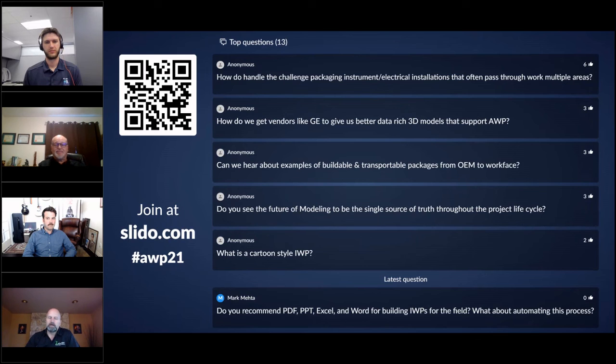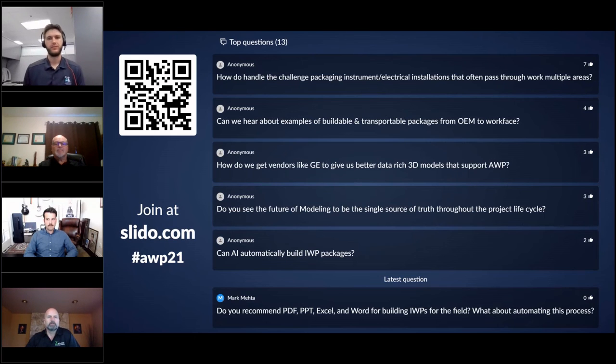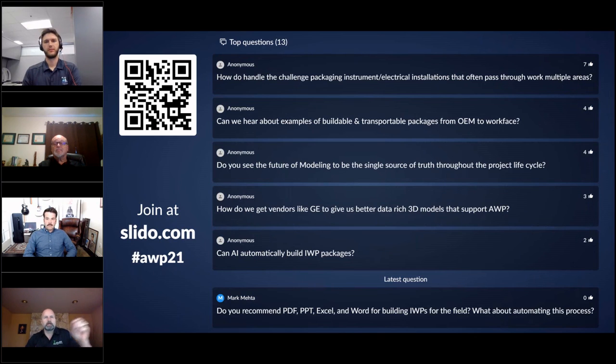Yeah, if you look at a 2-year average in the portfolio world on E&I, the packages fall in that 200 to 300 range, piping 400 to 500. When you get into the major projects, E&I was really falling in the 400 to 500 range, and piping is falling into the 700 to 800 range. Again, we should be tracking those numbers for future estimating of planning level of effort to build IWPs, not for determining the size of the IWPs.